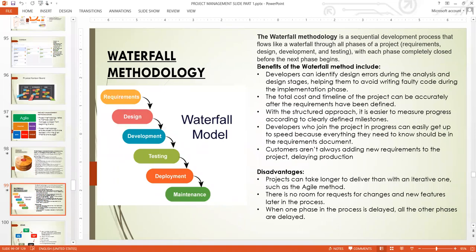With the structured approach in Waterfall, it is easier to measure progress according to clearly defined milestones. Because everything is defined, structured, and well planned, you can know your progress. Developers who join the project in progress can easily get up to speed because everything they need to know should be in the requirements document. If you are joining at the testing stage, you just get the documentation and know what you need to do.